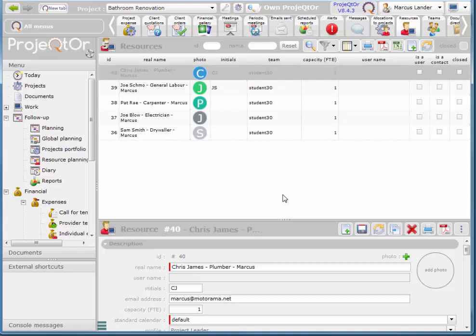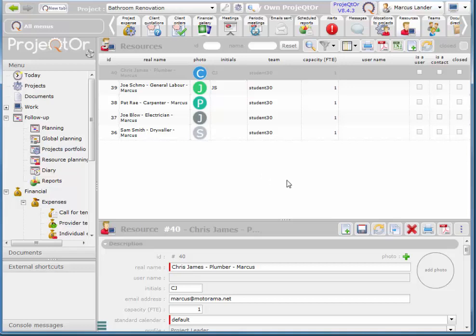Now the next thing we need to do is we need to allocate Chris to a project. He won't be available to be allocated to a task until we allocate him to a project.